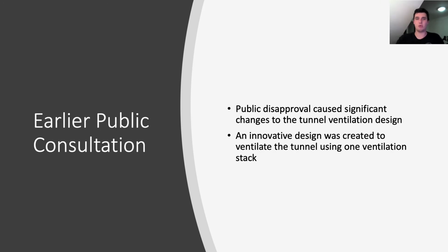Another factor that can be improved for this project was earlier consultation of the public. Just before construction began on the tunnel and after the conclusion of a public consultation on the design, it was decided that a ventilation tunnel was to be constructed to reduce the number of ventilation shafts required. As identified in the Cross-City Tunnel First Report, this was a significant issue in the planning of the project.